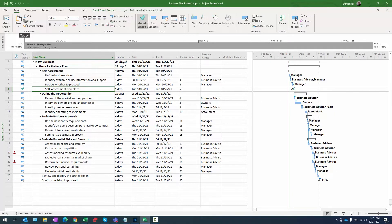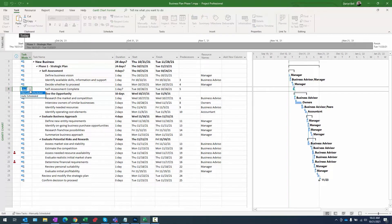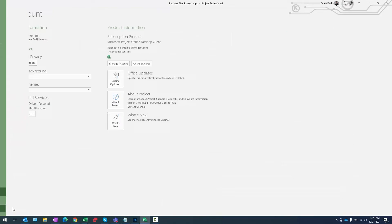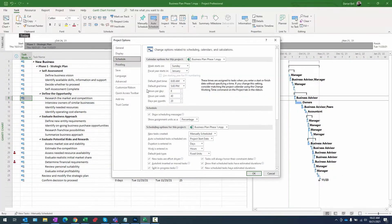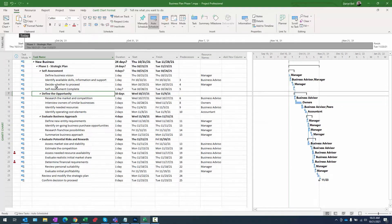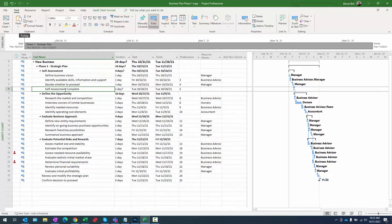You can see it automatically inserted the task and created dependencies, which is great. It did create it in manually scheduled mode, so I'm going to make it automatic. I'll go to the schedule options, make it auto for that task, and then make it auto for all. That takes care of that.